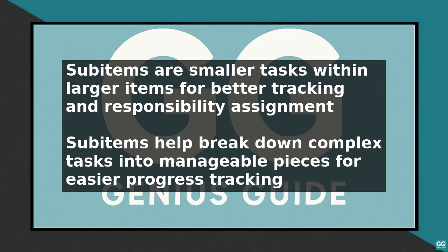Using Monday.com Subitems can greatly enhance your workflow and project management capabilities. To get the most out of this feature, it is essential to understand the best practices for implementing and utilizing subitems. First, understand what subitems are. Subitems are smaller tasks or components that are part of a larger item. They allow you to break down complex tasks into manageable pieces, making it easier to track progress and assign responsibilities.